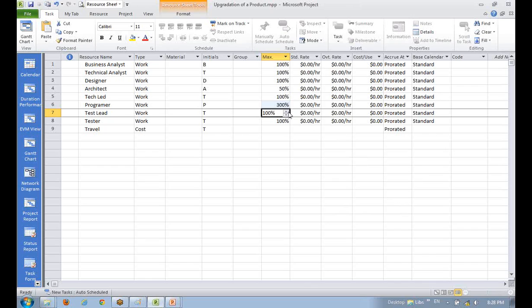Now when this 300, 400% will come in terms of labor, like in construction, we need 10 laborers, whomsoever will come doesn't matter to us. We need not identify them. There is no specific skill. We're not going to count their name. We just need 10 laborers. That's all. In that case, you can give percentage. But here, if I want to make 3 programmers, then I must give programmer 1, programmer 2, programmer 3.